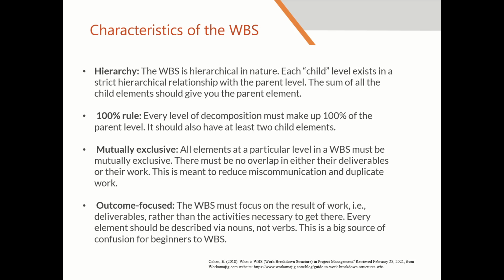It's mutually exclusive. All elements at a particular level in the work breakdown structure must be mutually exclusive. There should be no overlap in either the deliverables or their work. That is to reduce miscommunication and duplicate work.